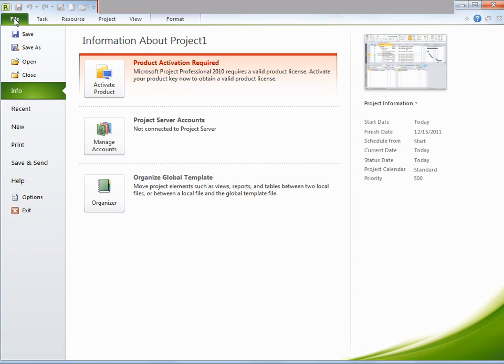Let's look at copy, insert, and move tasks and how to create phases out of tasks. Indenting and outdenting methodology is used to create phases from tasks. Summary tasks make phases, and subtasks are represented by tasks below the summary task. A summary task is essentially a summarization of the subtasks which fall under it.